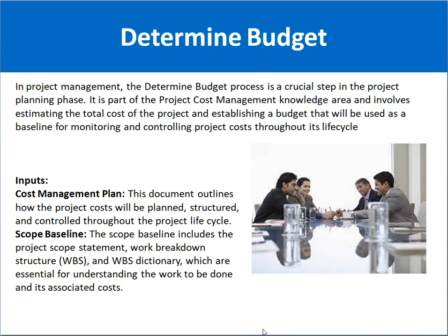So the inputs for this process of determining a budget, first one is the cost management plan. Cost management plan tells you how the project cost will be planned, structured and controlled throughout the project life cycle. Next is the scope baseline.